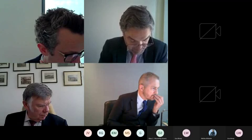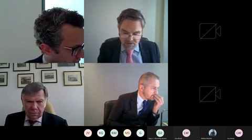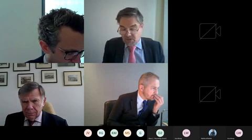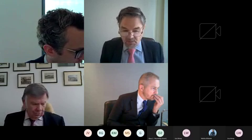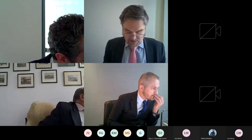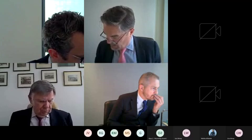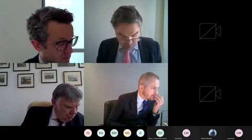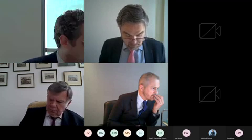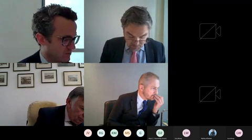The same applies for the hotel, but the ratio you take for hotels as per the municipality is 0.2 of a space for the keys, and so I've applied that. If you then take that number, 265 times 0.2 gives you 53 spaces. As you can see, what I've done is I've allowed on the hotel, I've allowed 137. So it's actually an amalgamation of the two.